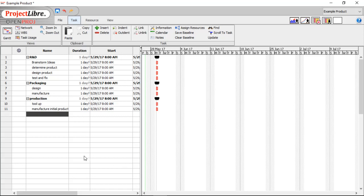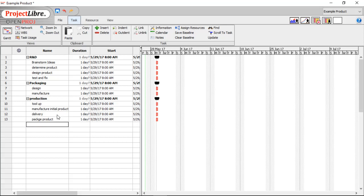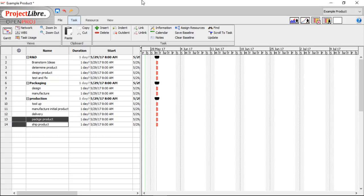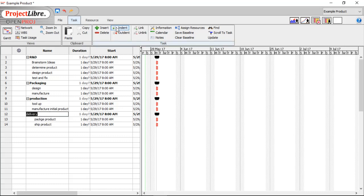After Production, we're going to have Delivery. Under that, we need to Package before we can Ship, and then Ship Product. Let's indent those past Delivery and outdent that back to the top.